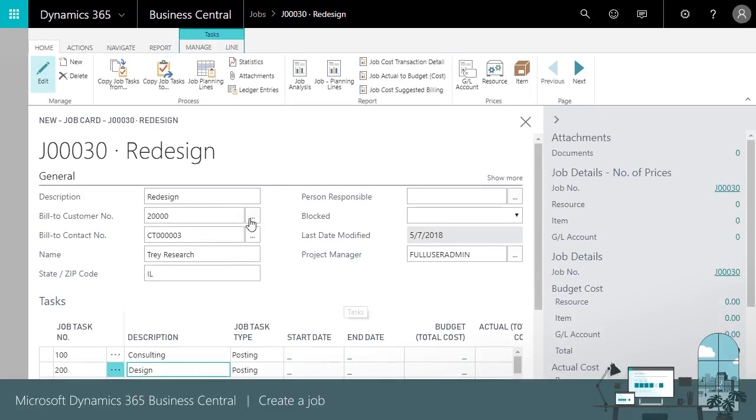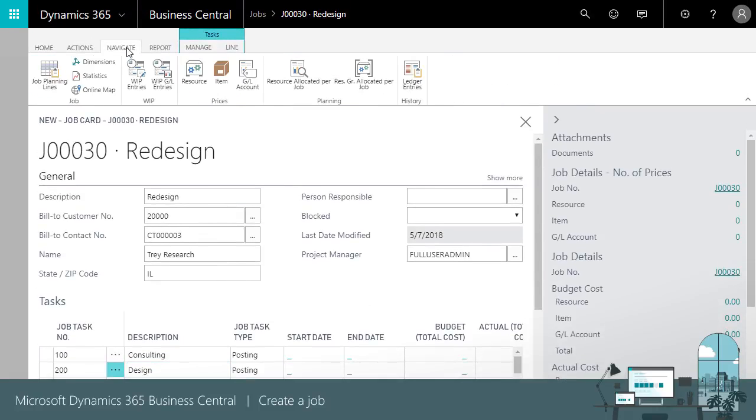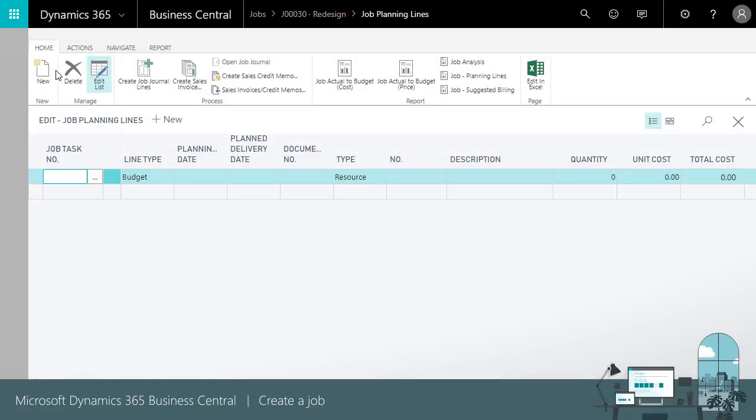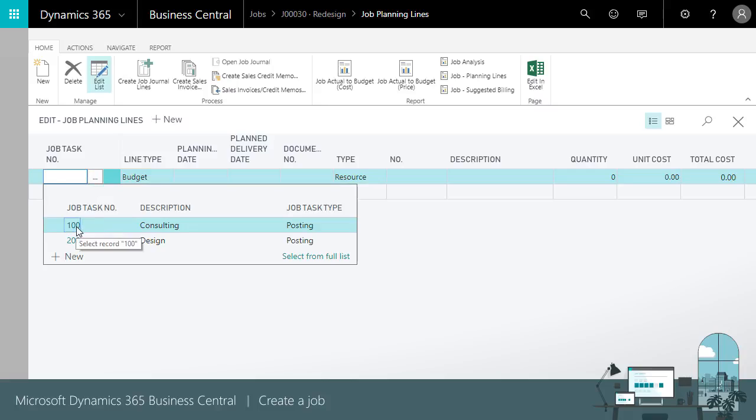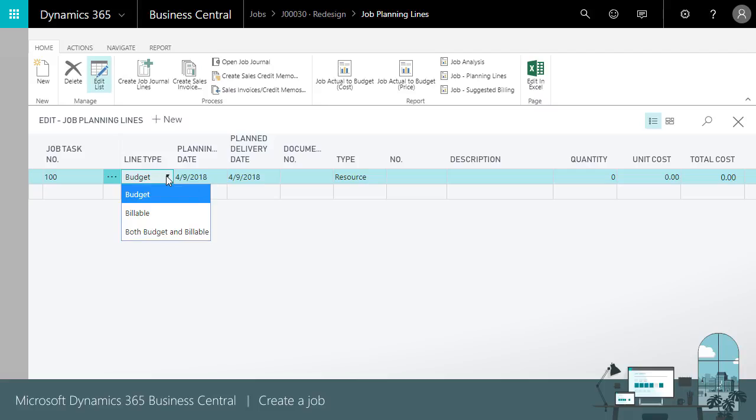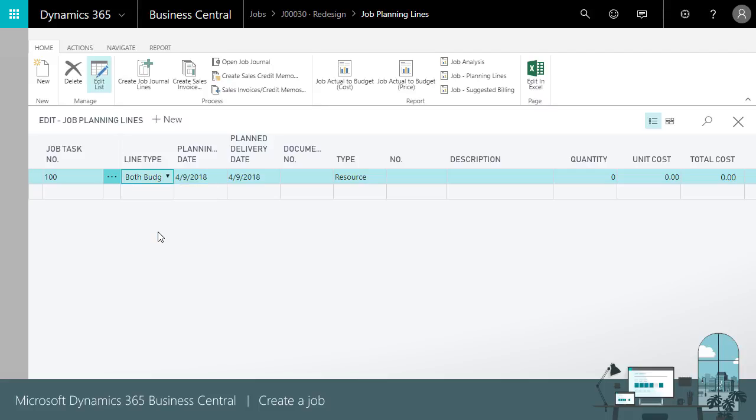To add budget information, we'll open the Job Planning Lines window. We enter the job task number or use the lookup. The line type can be budget or billable or both, depending on the line cost and how we bill the customer.